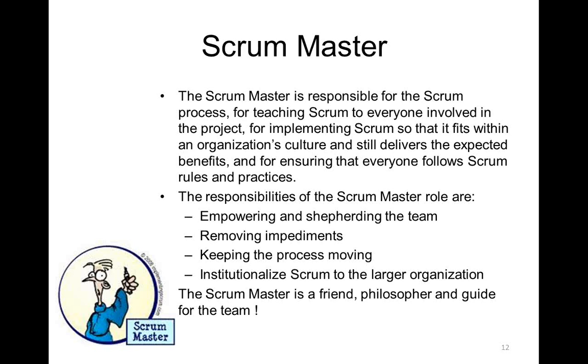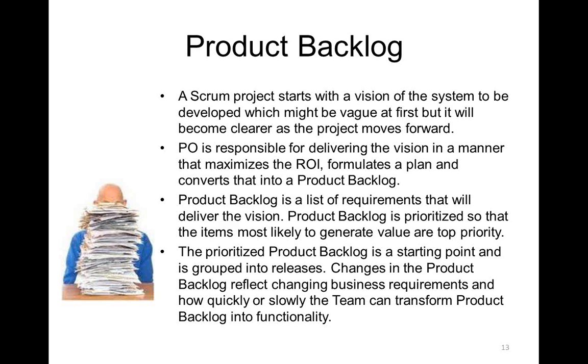Please note that Scrum Master is not playing the role of project manager or manager of the team. The Scrum Master doesn't have any authority on the team. Scrum Master is just helping them. The Scrum Master is there to provide them support. Scrum Master is there to help the team meet the commitment in whatever way possible.